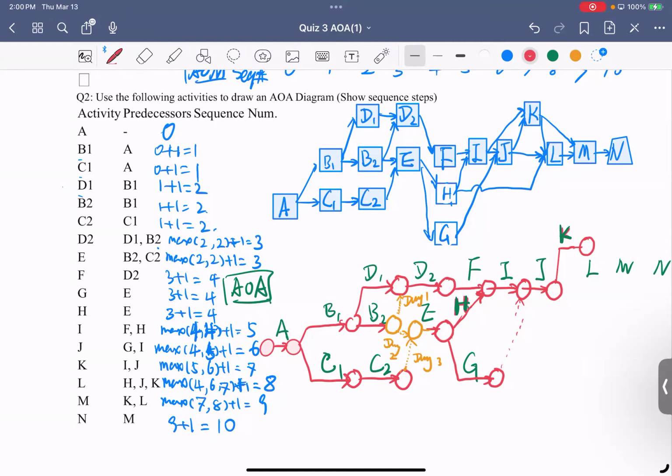We can do this right now, something after the J here to directly represent the key, no issue. But if we want to represent the relation between I and the key, we have to do this. A dummy, right? It does not make sense. It's weird, right? Yeah, it's very weird. So that does not make sense.